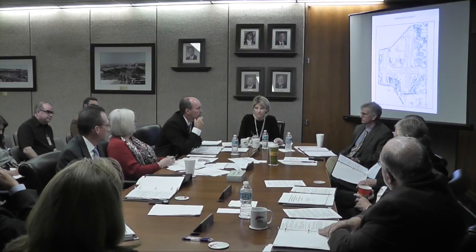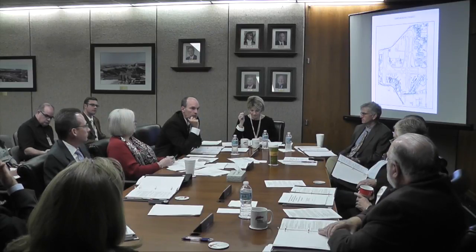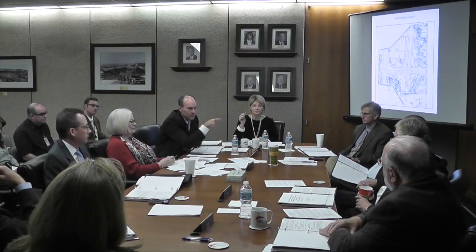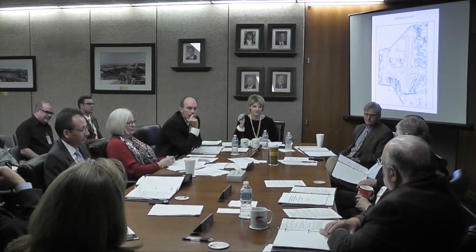The challenge, it seems, is that the control tower is a very unique building. It's at a high elevation. But we're also, I think, seeing the impact of construction activity in the Tulsa market. All of a sudden, the construction prices are high. And I think it's probably his project that's messing up. Yes. But that may change in 6 months. Yeah, it may. Okay. But so we're looking at that short-term solution.